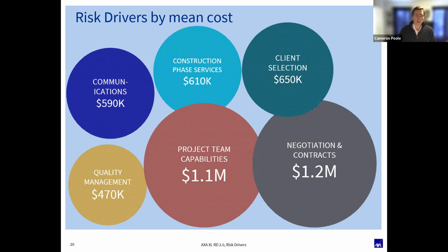The other thing we look at in contracts is it's critical to have a waiver of consequential damages in your contracts. So if there's a claim, there's two types of damages, right? You have your direct damages. Those are easily quantifiable. Maybe we have to redo some design work. Maybe there's X amount of cost to redo the system that was designed incorrectly. That's a direct cost, a direct damage. Consequential damage is further than that. That's loss of use, loss of rent, loss of income.